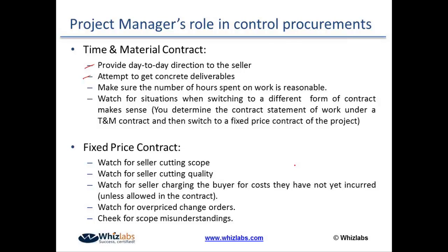So the answer to your question, Skittage, is whenever the solution or the product is not known, we go for time and material. It's the least preferred method, and it's applicable only for small projects wherein, let's say, I'm hiring expertise from outside, or I'm hiring professionals from outside. Those kinds of projects I would go for time and material.